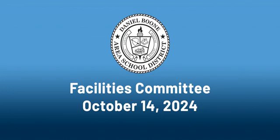So it does push everything back. Controls are scheduled for October 25th. We will recommission the new units on October 21st. Are we gonna run into any heating issues? No. As long as we get the units back up by the end of October, we'll be okay. Okay.